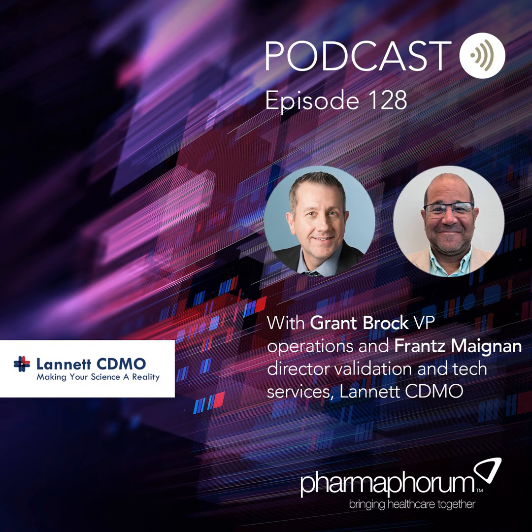Well, I think there's a couple of different approaches that you can take to keep cost efficiency and stay on schedule and within budget. Designing and scheduling the experiments that you're going to do in your design of experiments, if you will, to maximize the amount of knowledge you gain and minimize the amount of material you consume, works very well. The other thing, as you start to develop timelines, is assessing the key tasks that you need to execute, and figuring out what are critical path items and what items we can execute in parallel versus in series, just to save time and get to your milestones.